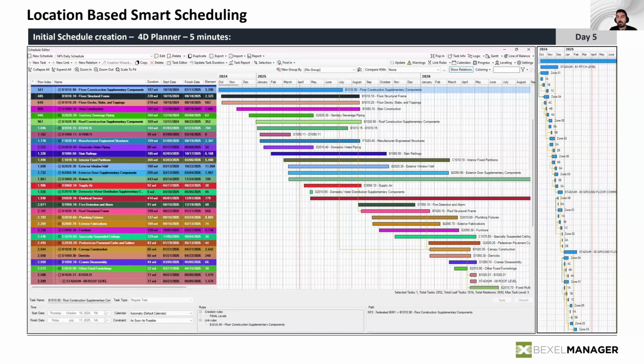How this was done, we specified the normatives. So for every group of work, we specified what is the capacity that is expected, of course, in coordination with the general contractor. What are the expected capacities for specific groups of works? What is the maximum capacity per day?